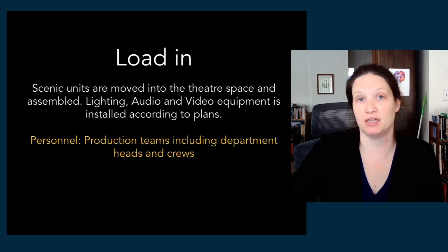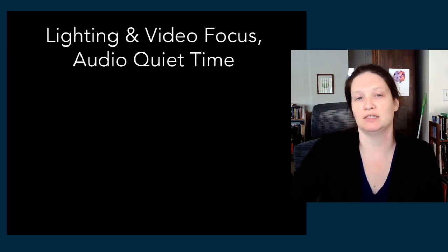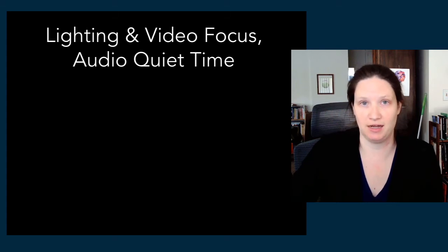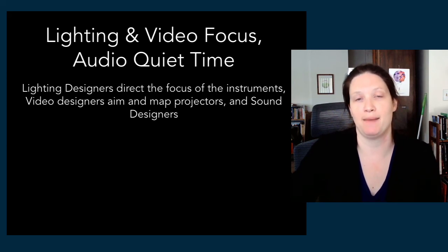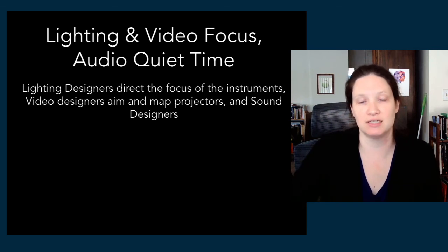So once everything is loaded in, lighting and video focus time and audio quiet time are scheduled. And so this is when your lighting designer will come direct the focus of the instruments, where they're pointed, make sure the colors are all correct, all of that stuff. Your video designers will aim and map projectors and prepare. And then your sound design team trails off.